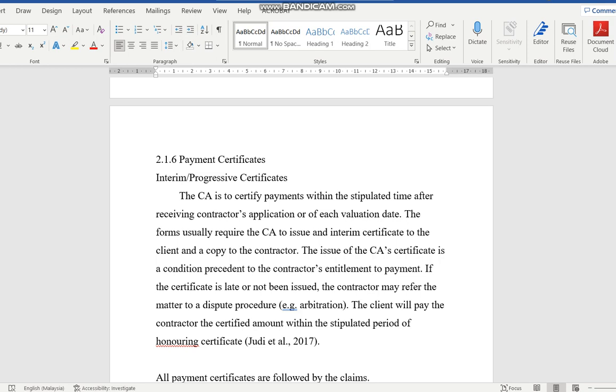Like I said, when there is expectation that there may be some form of extra work that needs to be done. Some part of the design, actually, the client realized that it may not be as what he likes, but he isn't sure about what he likes at this point in time. So he just leaves it there. He just puts an amount of money there in case he wants to add on later. He wants to use better materials, he wants to add on more quantity.